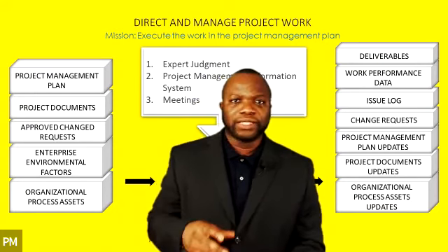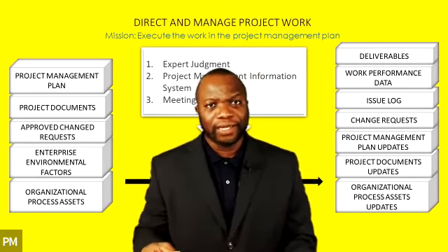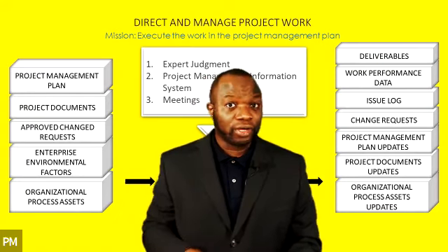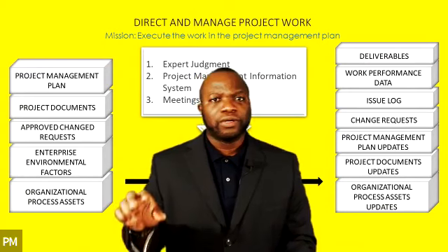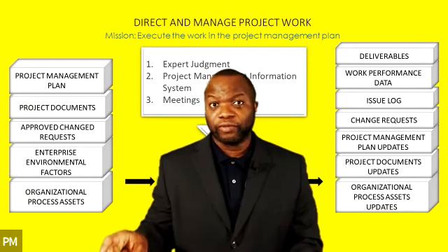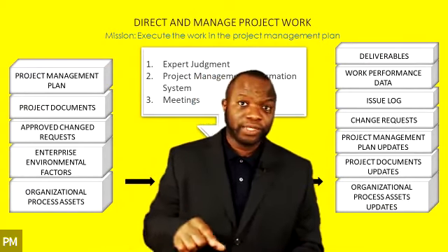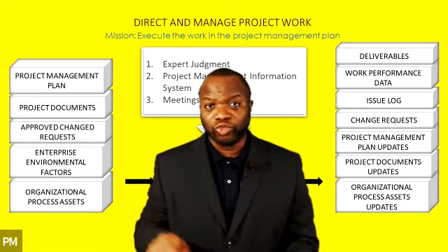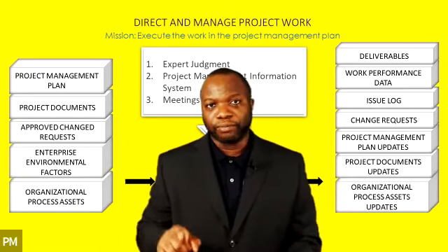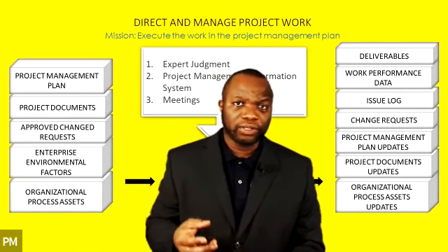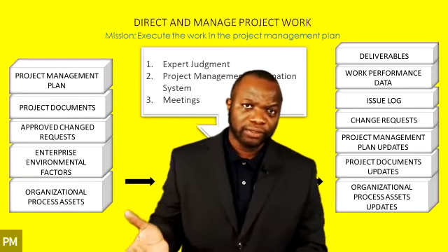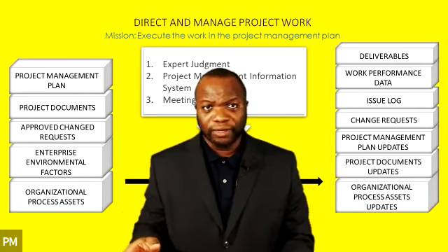However, there is a schedule baseline. That does not change. The schedule baseline is the original schedule etched in stone and frozen that management is going to look at to hold you accountable. But the project schedule is for everyday management of the project. And you can change that.